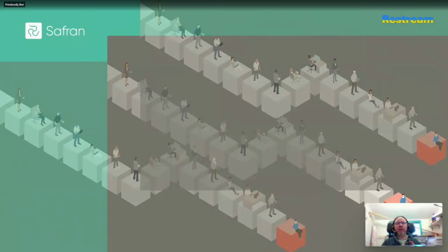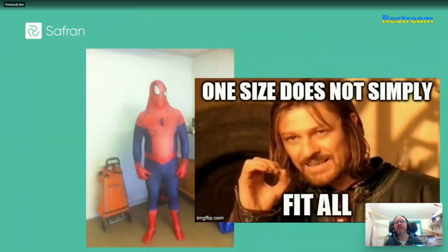So just a little spoiler alert from me, I personally don't believe in a one-size-fits-all approach to modeling, partly for the reason I just mentioned, but also because we live in an imperfect world where not everybody has readily available information to the desired level of maturity, or maybe you have a customer or an organization culture that just doesn't support your modeling efforts. But that's okay, because you can still make the best use of what you have. You can substitute data for assumptions, then clearly caveat those in your reports, and then they form the obvious next steps for future refinements until your model does actually become indicative enough and therefore useful enough to support decisions and secure project objectives.